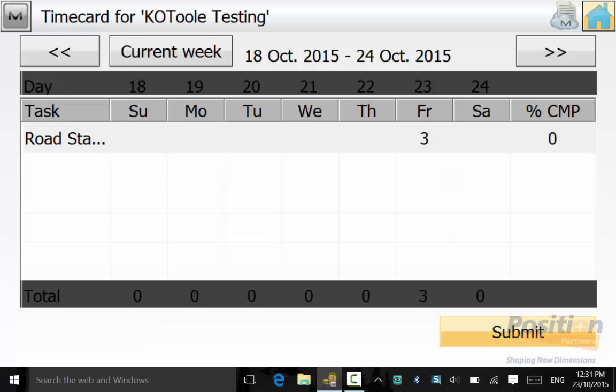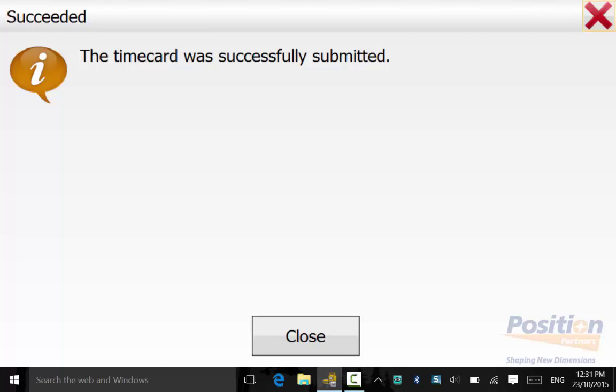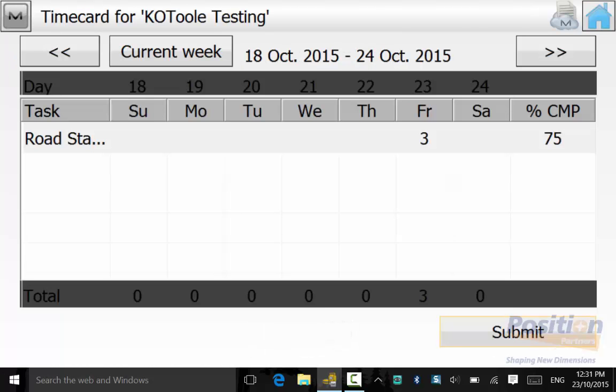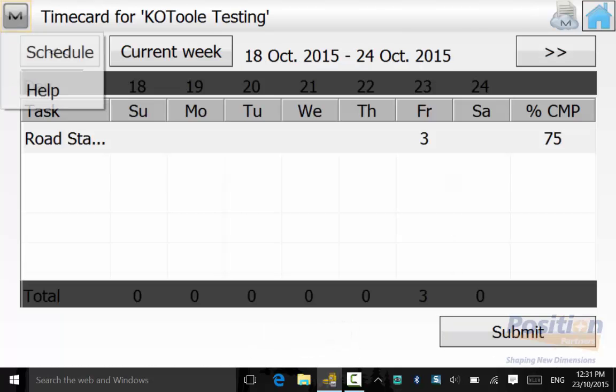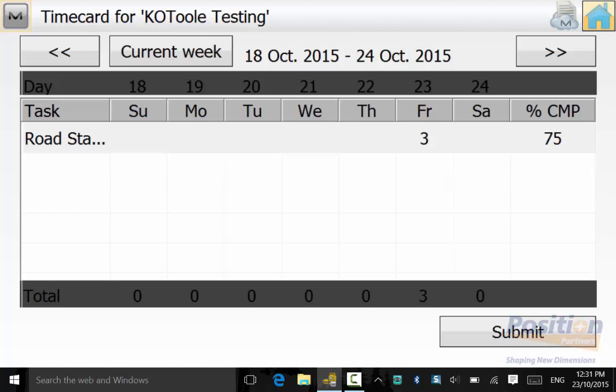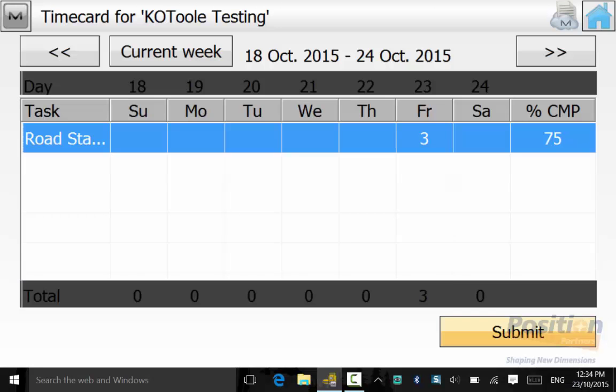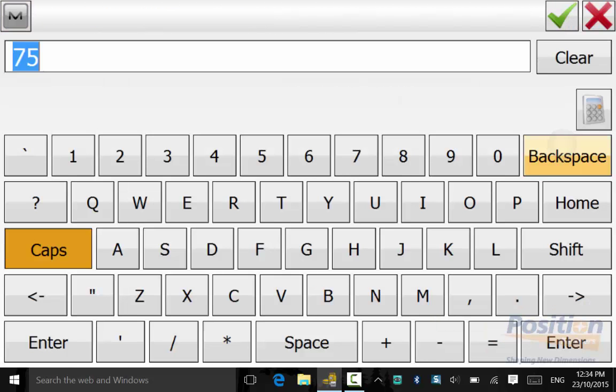When you hit Submit, it will come up with 75% complete. You can go up into the Magnet Symbol and hit Schedule. The schedule shows that one task. In Magnet Enterprise, the Project Manager has set a task that would take 4 hours to complete, but we know that we have fully completed the task. So we will manually type in 100%.